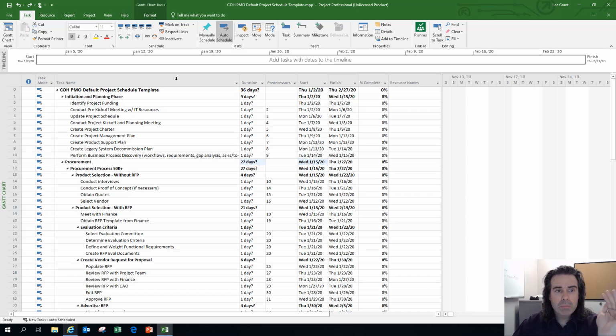Totally up to you. But go through the tasks. Keep what you want, kill what you don't want, change some of the names as necessary. It shouldn't take you too long to take a stab at that. Don't expect it to be accurate. Take a swing. That's critical, because once you have done that, if you're following the process, the next step is that you want to establish your predecessor relationships.